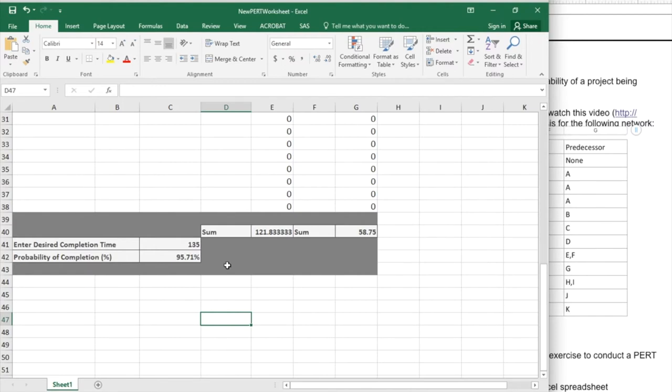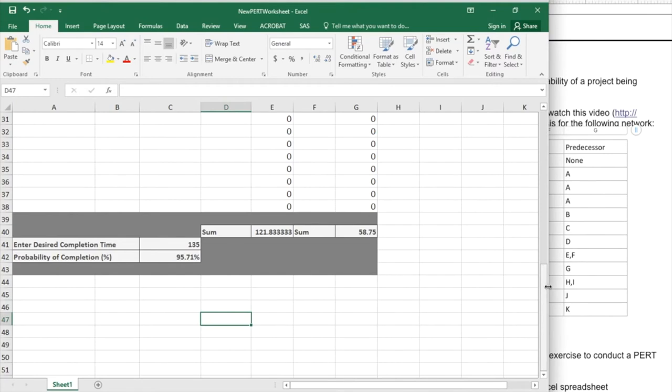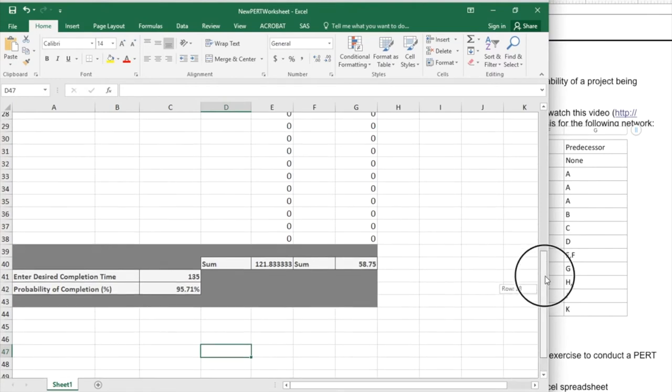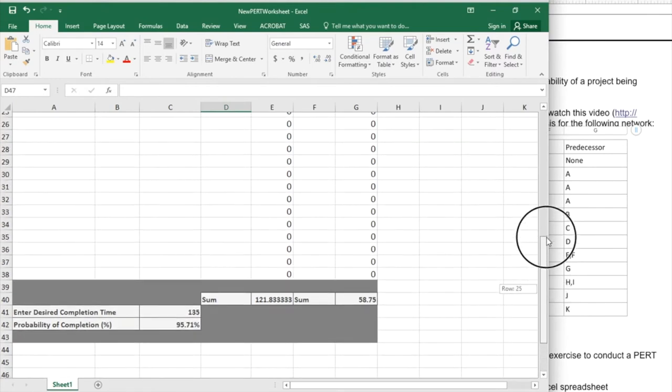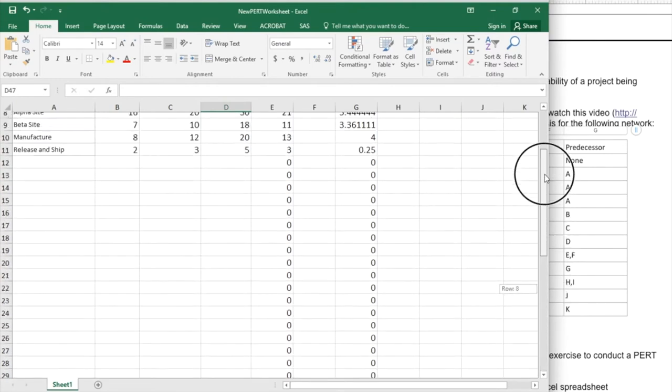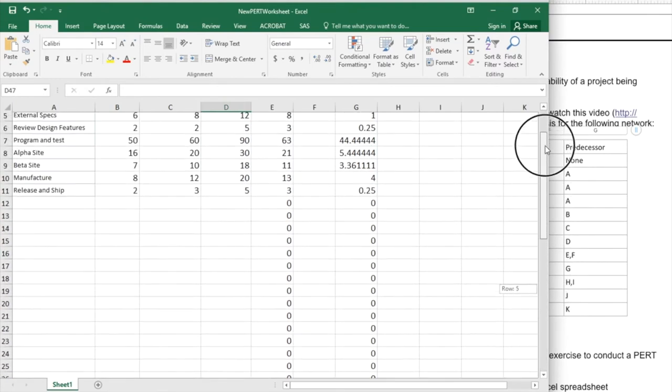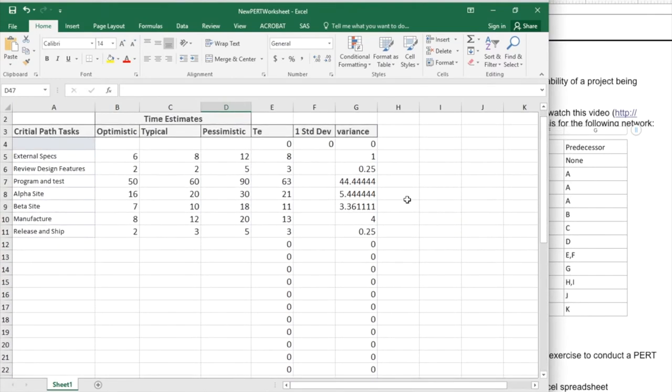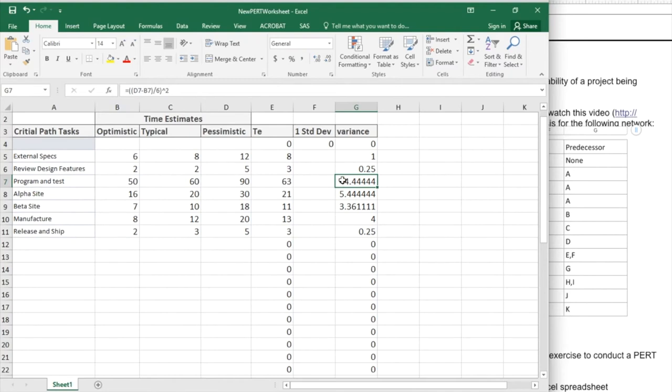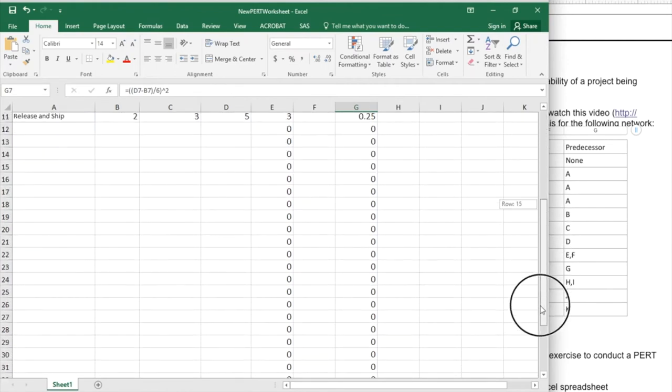Okay, so we might want to add an extra 13 days or so to our timeline. We might want to add extra resources in order to pay for labor, pay for any materials that would be required. If those tasks that looks like here, this one has a lot of variance in it, so a high degree of variability, that one might be more likely to actually go over.